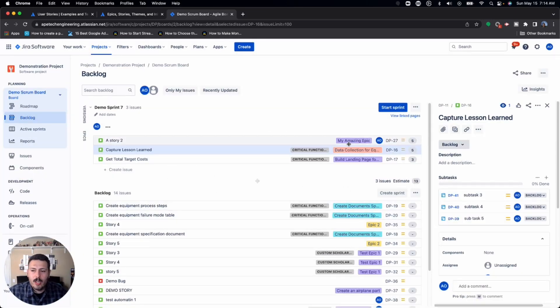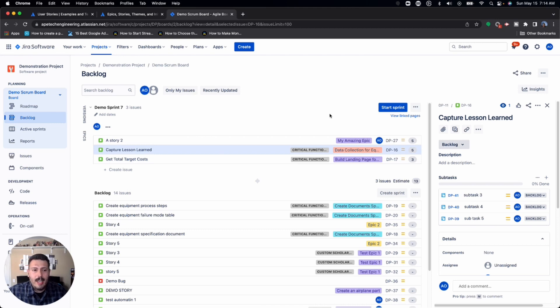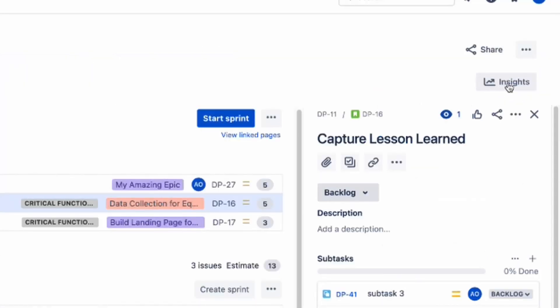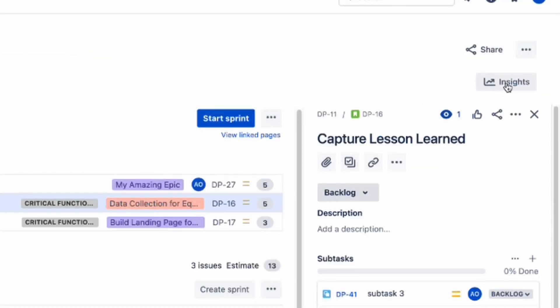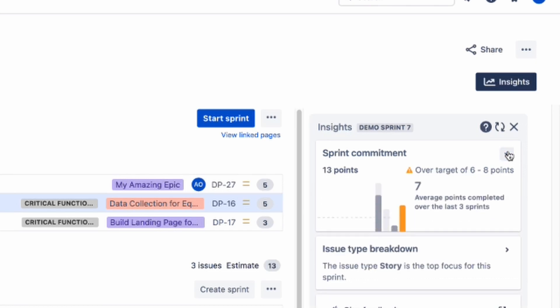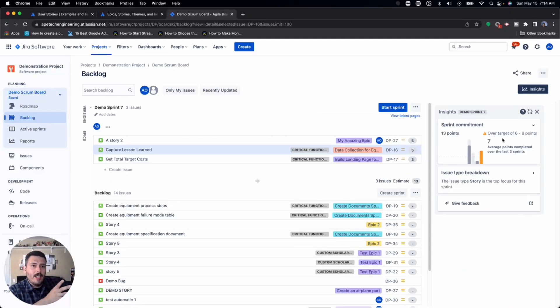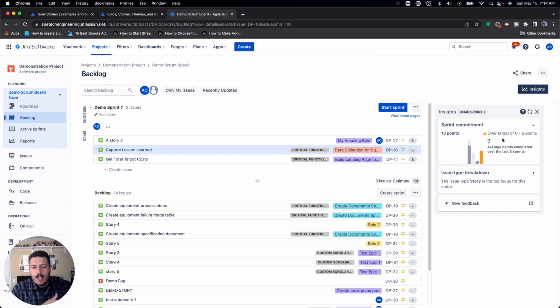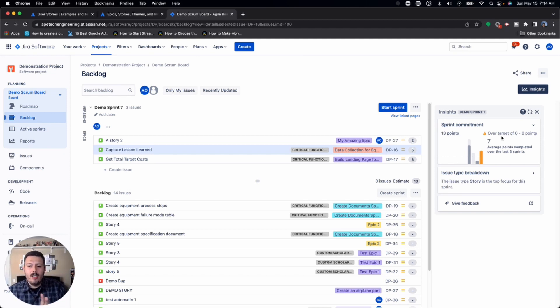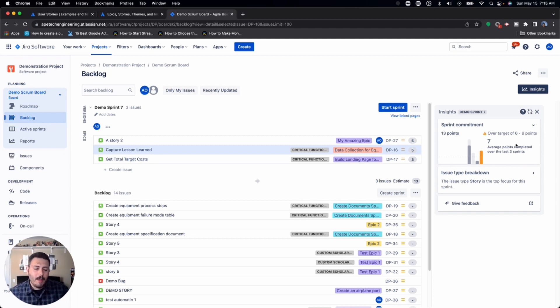And then the last tip that I want to show you, and this is a fairly newer feature of Jira. And again, something you really only get in these company managed projects is if you swing yourself over to the right side, you're going to see this insights button over here. And so if you click on that, this will actually show you your sprint commitment. And this little feature is basically telling you based on your previous ability to complete your sprints, you might be over committing your team, under committing your team, or your team might just be committed just right. So use this as a guide to really help you understand if you're within the bounds of what you should be doing, so you're setting your team up for success.